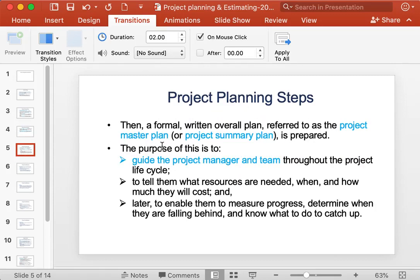After that, a formal overall plan is prepared, called the project master plan or project summary plan. The purpose is to guide the project manager and team throughout the project life cycle, telling them what resources are needed, when, and how much they will cost. This master plan also enables the project manager and team to measure progress, determine when they are falling behind, and know what to do to catch up.